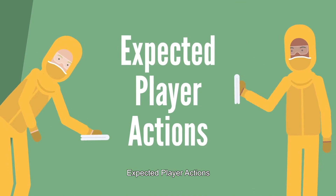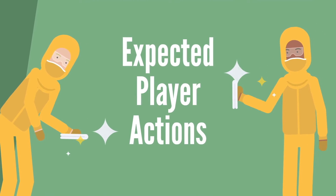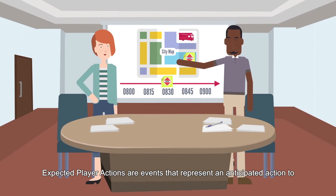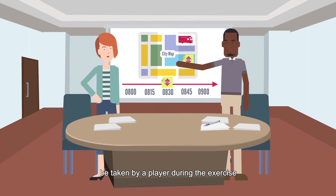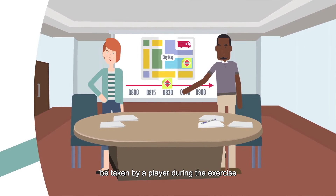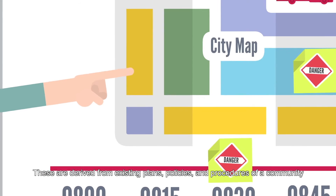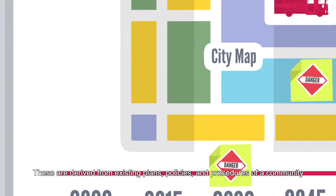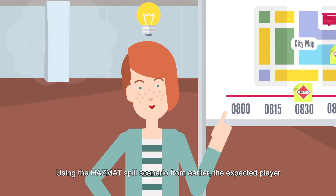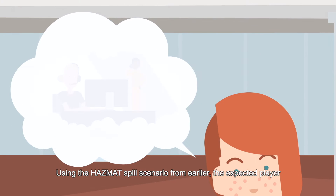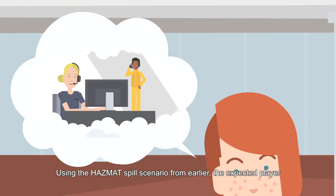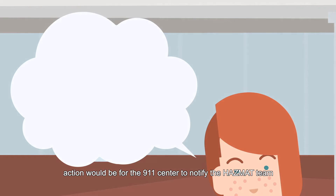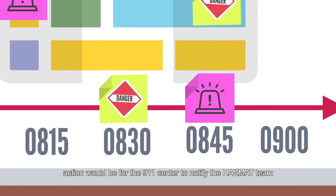Expected player actions are events that represent an anticipated action to be taken by a player during the exercise. These are derived from existing plans, policies, and procedures of a community. Using the hazmat spill scenario, the expected player action would be for the 911 center to notify the hazmat team.